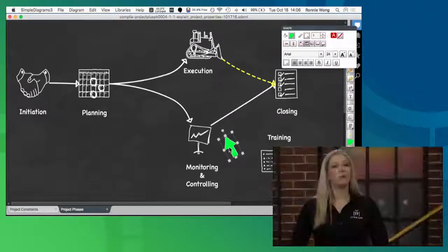Okay? So would it be safe to assume that all of these processes, or these phases, are pretty standard and you can't omit any of them? Well, yes and no again, and the reason why is because of the way that we tend to do project management at a small scale, right? So if you're only using a small project and there might be 2 or 3 people, you might find that, because you've known those people for a long time, not saying that you should do this, but in a less formalized project management, you might skip over initiating the project and the planning and just go right into executing.